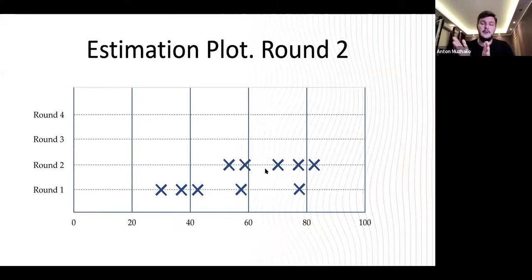We should at least give some range. So for example, we can assume that 20 points is the acceptable range. If we are talking about 1 to 100, 20 points is just 20%, no problem. So we can put it to this range. And when we get it, let's say a range from 62 to 78, we say, okay, there is a 16-point difference. So we can take the average, which will be 8. So it will be like 70. 70 points is the estimate of the team. Okay, let's go. Let's take it. So this is how it goes.